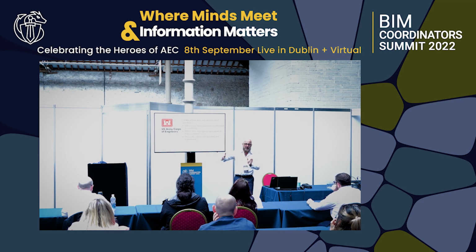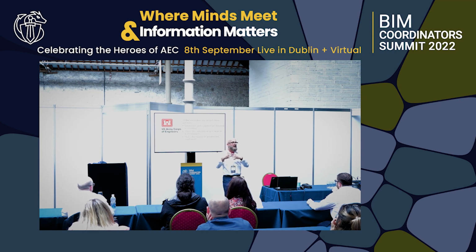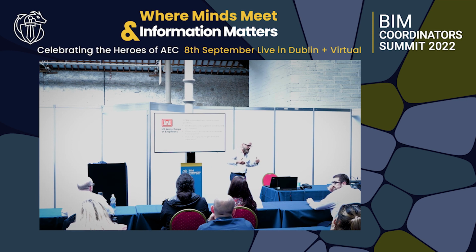So one of the things that we always look at in terms of COBie is making sure it's progressive development and looking at each stage and making sure that the design team are on board, whether we're working for the design team or we're working with the client, is making sure that that information is going in. And we have key performance indicators. We have percentages complete at any stage to say, stage 2, if you've got a model, you just need a classification code on the entity. At the end of stage 2, if they're only 70% complete, we'll let it go. But we'll flag it to say, by the end of stage 3, this needs to change. So it's about trying to educate people and move forward.